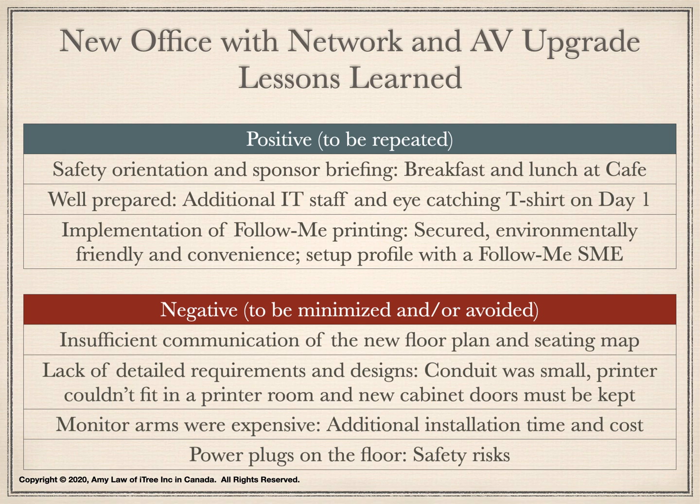Another example was the printer location couldn't fit the printer. It was off by 2 feet. We had options. Again, they would lead to additional budget and time. Option 1 was to replace the printer with a smaller model. Option 2 was to move the wall or power plug to accommodate the printer. Option 3 was to find a new location and move the printer with a series of adjustments to the floor plan followed by approval and communications. Ideally, the detailed requirements and design should have been identified at the beginning of the project.